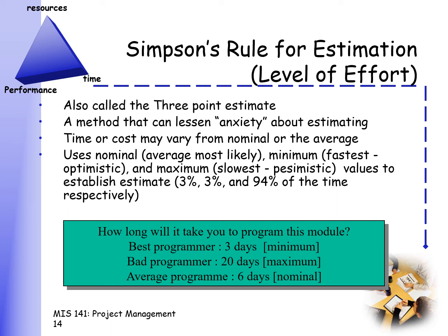You choose one who is the average, or who can do the activity in an average amount of time. You choose a second person who can do that activity as quickly as he can. And the third one is someone who you think does the activity in the slowest amount of time. The idea here is that because you get a range of time estimates and then you average them, you will get a sense of roughly how long that task would take to finish on the average.